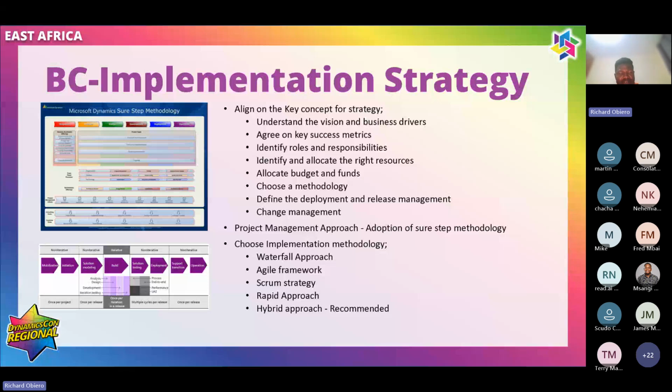One thing you need to run with all along is, if you know the base solution, whenever something is being introduced, you've taken your entire functional requirements process and documented it. When you look at the base solution, you've generated a document called a fit-gap analysis. This fit-gap is telling you all the things you need to customize.